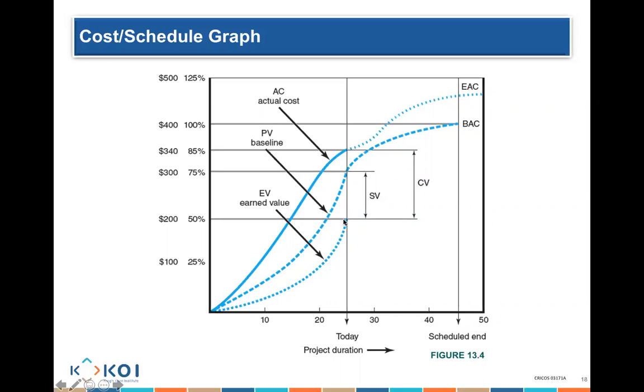And when you compare the earned value line to the actual cost line, you get the cost variance. That's really what you need to bear in mind. The project was supposed to cost me only $100 when I have done 100% of the work. But in reality, it's now expected to cost much more than that because of how I am progressing in terms of the work.